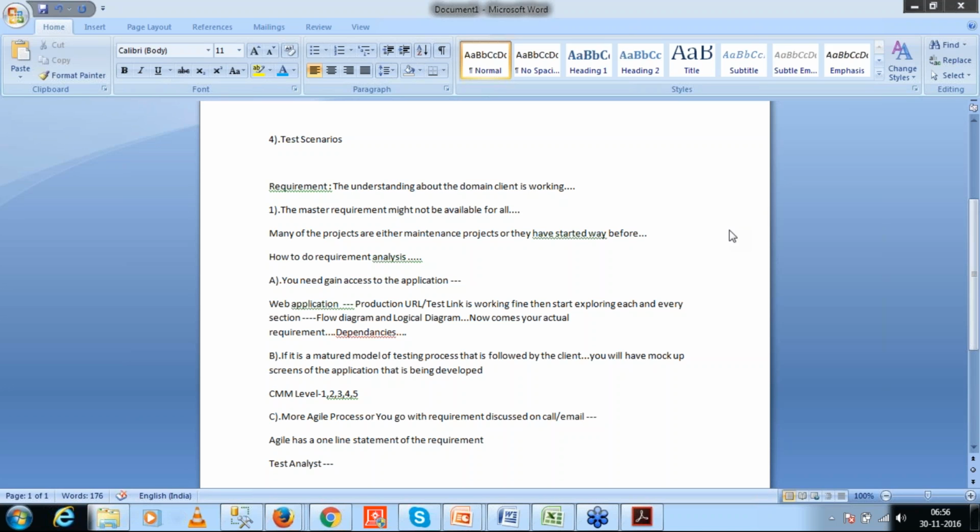Okay, so in an agile environment, or the Scrum model which we use, you will have user stories defined for each and every sprint. A sprint is something like a release cycle, generally 20 days or 1 month. When you define a requirement, it would be a one-liner or just a paragraph, telling that I want a link in the trash and this should be able to delete all the messages present in trash. So generally user stories will be a single paragraph or single liners.